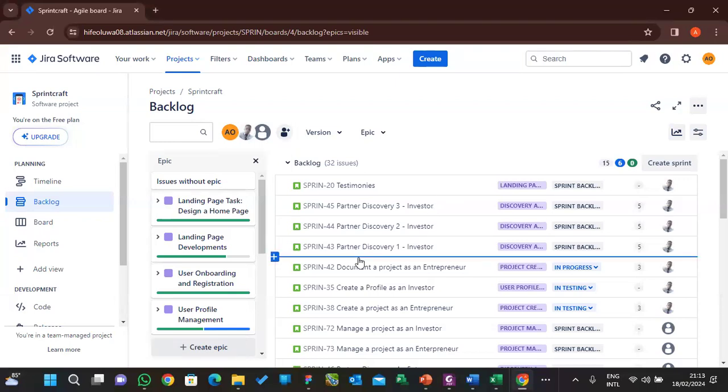Okay, so to have a good product backlog, of course, you must ensure that it meets what they call the DEEP criteria. The D stands for detailed: the product backlog item must be well detailed. The first E stands for emergent. Emergent means that the product backlog is continuously updated as long as the product is ongoing. You need to keep updating your backlog as more information is learned.